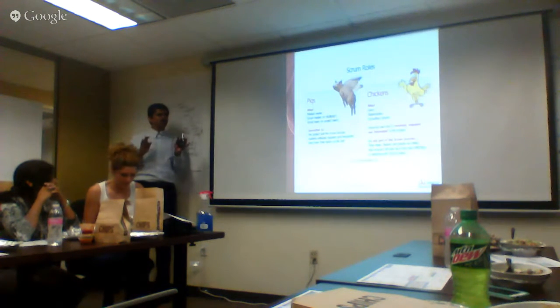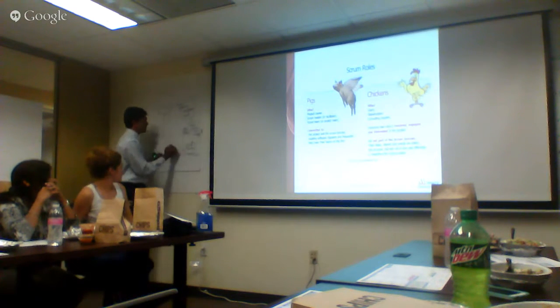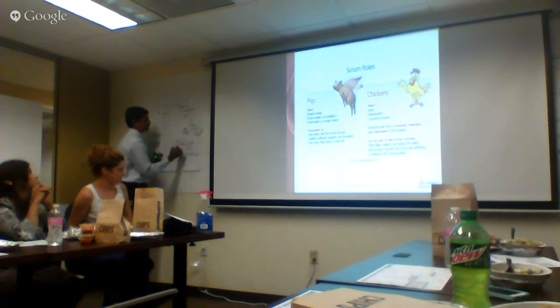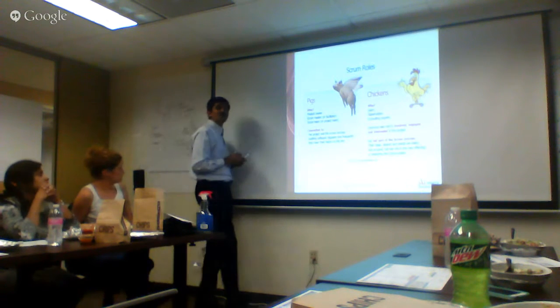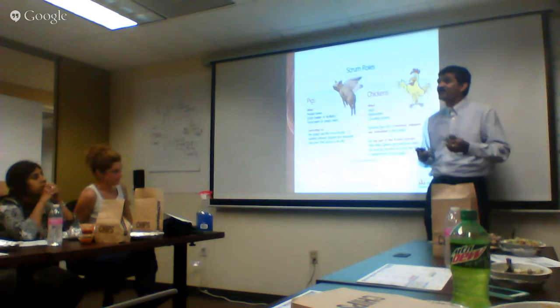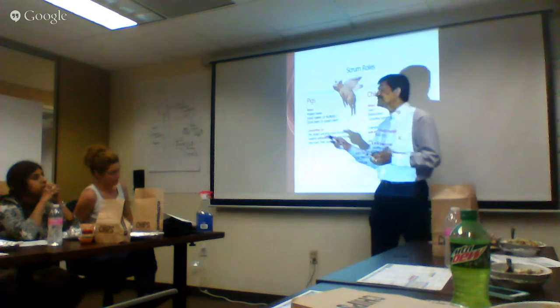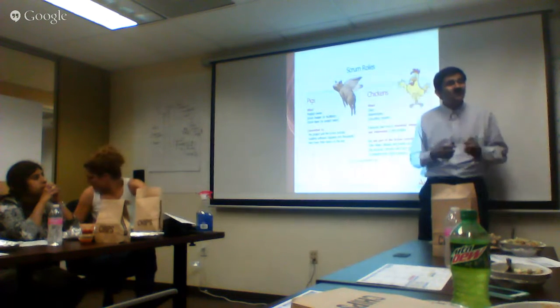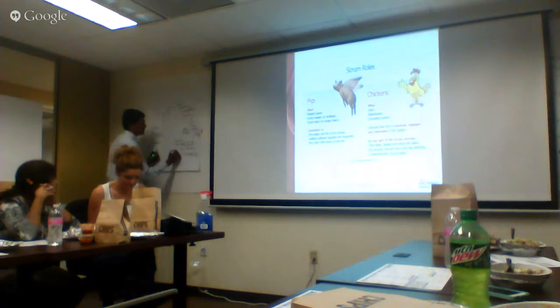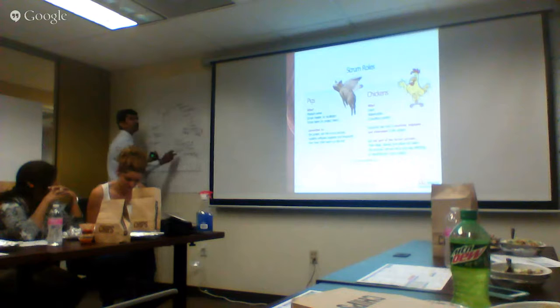All the users are asked to leave the meeting room, and only the team stays in that room, and they have the third meeting. It's called the sprint retrospective meeting. In the sprint retrospective meeting, they decide what process worked, what did not work, what we can improve on, and what new things we can start doing. That is inspection and adaptation at the team level, process level. So Scrum is an empirical process that is full of inspection and adaptation at the sprint level, product level, and team level.